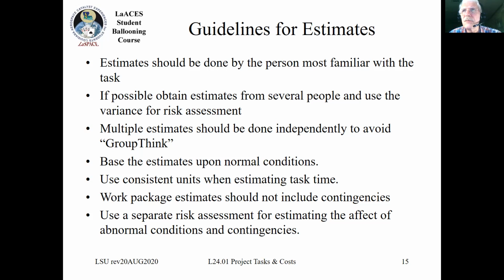Try to keep those estimates independent. Doing estimates as a group, you'll quickly come to a conclusion which may or may not be correct. So try to keep your estimates independent and then come back as a group to compare what you do.